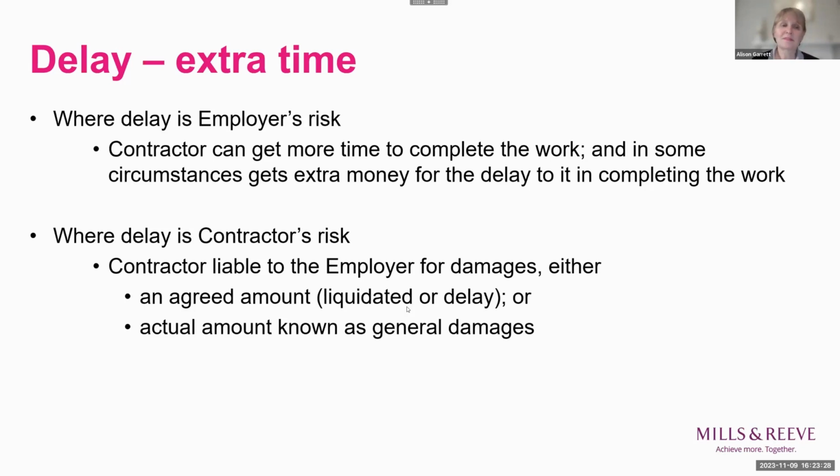And in some circumstances, the contractor can also get extra money for the delay to it in completing the work, because it'll be on site for longer. So it'll incur things like site setup, it'll have labour on site for longer, those sorts of things. It can sometimes claim for the extra cost of that.